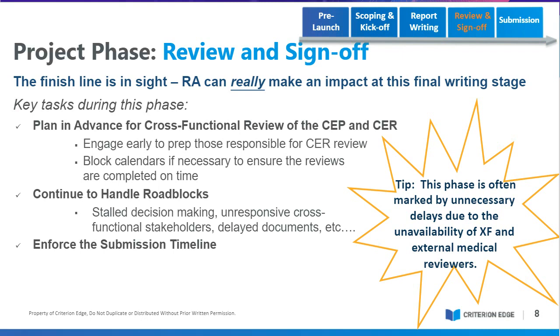So we don't recommend having a review like that. Everyone should review their own sections, and as we tend to say, stay in your lane, cross-functional reviewers. For us, the first review is the pre-draft, so there may be a typo or two in there. Please don't worry about a missing period or capitalization. We'll fix that in our review and in our final QC. When I say stay in your lane, I know that sounds a little rude, but what I mean is stay with what you know, why you're there at the table reviewing. That is the most useful to the writers. And then always at this time, regulatory affairs, enforce the submission timeline. You're almost there. Keep people moving.